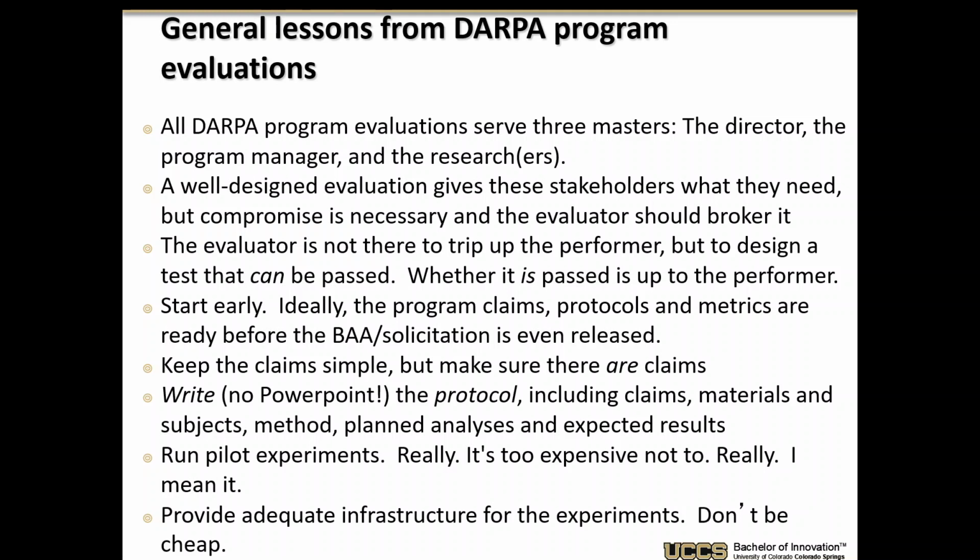If you're trying to figure out what the program is going to do as a DARPA program manager, you want to start early. You want to figure out the program claims and protocols before the BAA is solicited. In practice, what most DARPA program managers do is go talk with various researchers before they pitch the program.